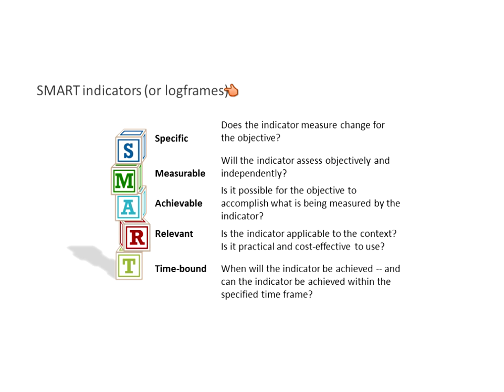You may actually do a baseline when you start implementation, or at some point after you've written your proposal or your main project documents. So I'm just saying, I think this SMART is a good framework, but that you just need to make sure you've got them somewhere in the project before you start up.